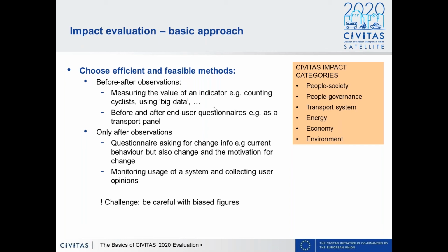We have to collect data. And we see 2 main strategies: before and after observations. In fact, if possible, those are the easiest ones. You just have to subtract figures. We can also do before and after questionnaires, asking people what they think, how they behave, and things like that, and make the comparison.